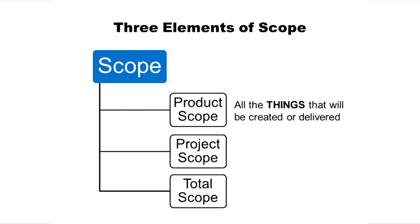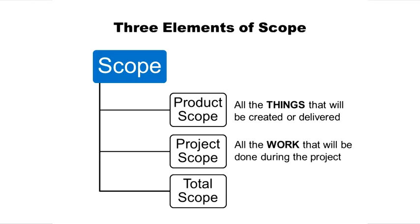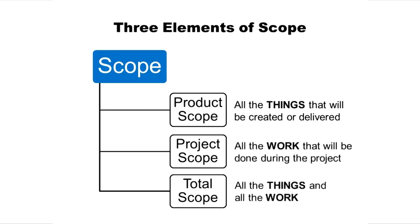The product scope is all the things that will be created and provided by this project. Once we figure out all the things we're going to create, we do a project scope, which is all the work we have to do to create those things. When we put both together — all the things we're going to create and all the work to make that happen — we have the total scope of the project.